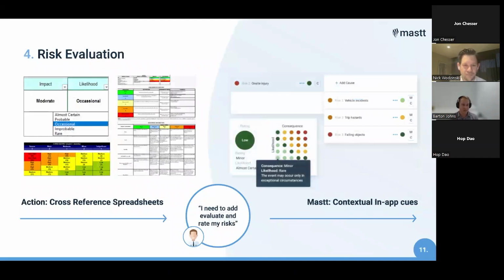But really you just walk through it, that little table that you can see over to the right with the coloured dots, and you assess the risk likelihood with everyone in the workshop, as well as the consequence of the risk, and you click the button and it applies that risk rating. So extremely intuitive, and yeah, it's been a good experience in the workshops going through these ratings.